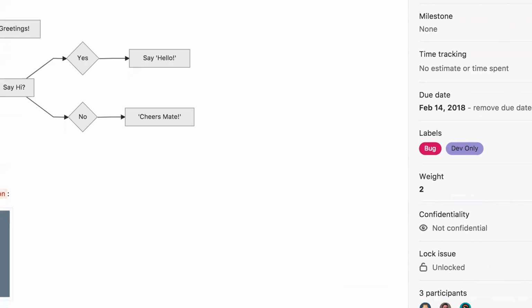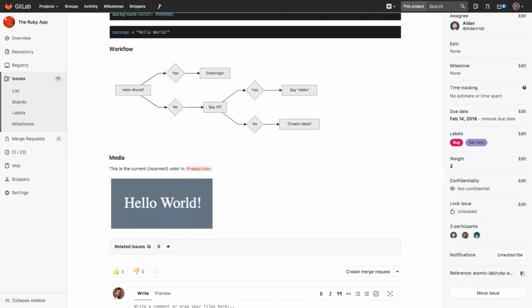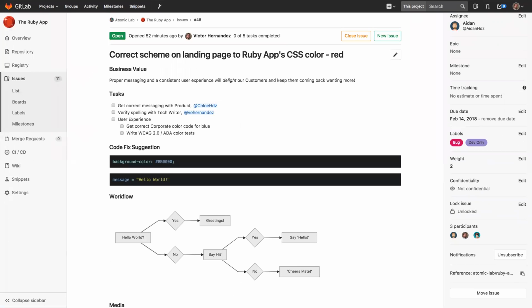And we're doing some relative sizing. So compared to other items in our backlog, it's a 2. Not too big. I believe that this is right depending on the types of changes that have to be done at the code level. So that's me, the dev team lead, having entered one item in our backlog as part of that planning process, that ideation process. Let's go to a different browser.